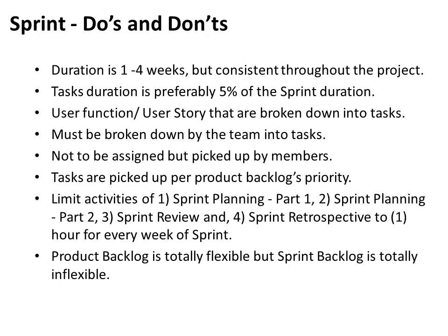And if you do too long a sprint like 4 weeks, there is possibly a higher risk, like there might be certain things you're doing, the stories are not reaching the product owner and customer early enough, so there's a higher risk. So it's a balance that has to be achieved depending on how dynamic the product is and how fast things are changing in the environment.